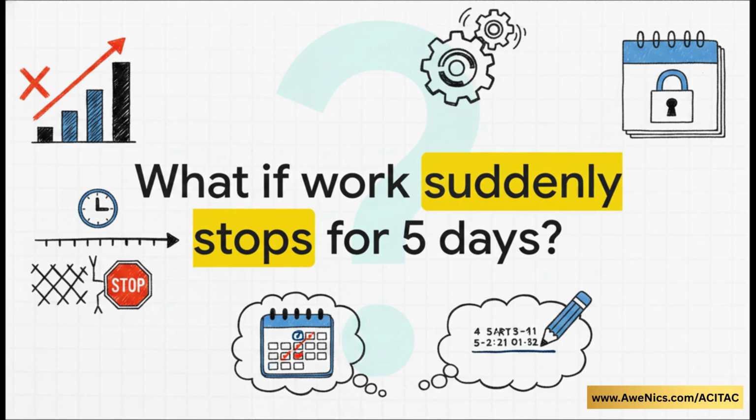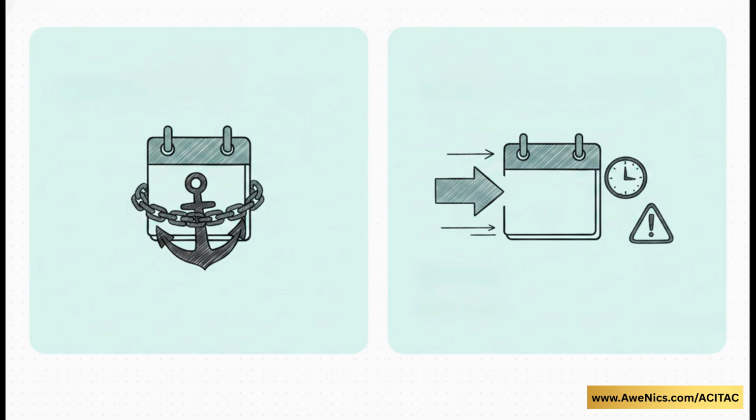Like, do you go back and change your baseline? And this brilliantly illustrates why we use this system in the first place. Remember our cardinal rule from earlier? The baseline is frozen. When that 5-day delay hits out of nowhere, your baseline remains exactly as it is. It literally does not move an inch.